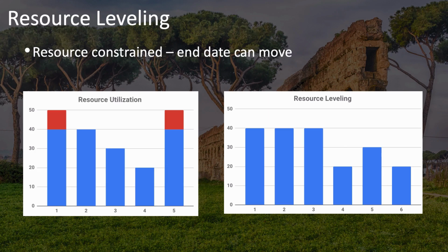Notice that we didn't just simply tack those in the middle. We had to actually extend this an extra week. In this case, it's because there were other factors and other things that this resource is working on that prevents us from using this resource fully in those other weeks. And so we had to add another week and put this extra work there in that 6th week.